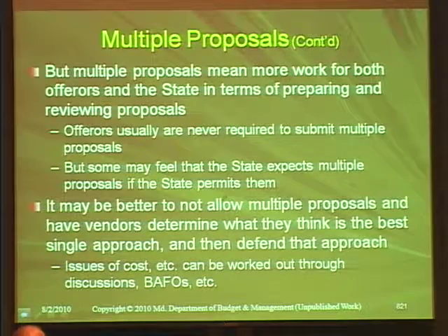Multiple proposals mean more work for both offerors and the state in terms of preparing and reviewing proposals. Offerors usually are never required to submit multiple proposals, but some may feel that the state expects multiple proposals if the state permits them. It may be better, maybe, this is where we're not telling you what the right answer is, better to not allow multiple proposals and have vendors determine what they think is the best single approach and then defend that approach. So issues of cost, et cetera, can be worked out through discussions and BAFOs.